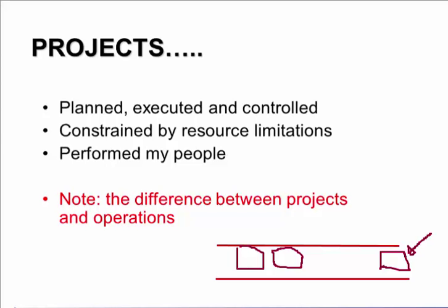And because the packaging machine doesn't exist or needs to be modified, but it doesn't exist in the form that is exactly there, we then have to go through the process and decide on the task in terms of what is required to bring that function to the process, including a planning phase, a requirement phase, a design phase, a build phase, a commission phase, and then an operational phase.